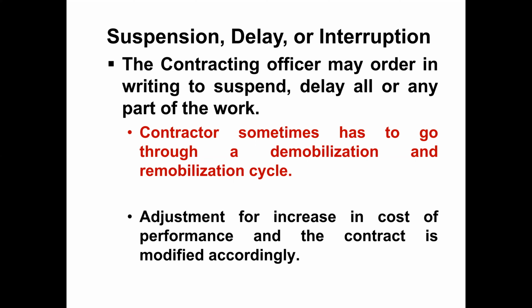Sometimes they have to do demobilization and remobilization. It means they have suspended the project. The project remains suspended for 6 months or 9 months. Then they ask again, okay, please mobilize your forces, bring your equipment on site, bring your labor force on site. So it means it's remobilization. Okay? So if these things happen on the project, then adjustment for increase in cost of performance and the contract is modified accordingly. Okay?